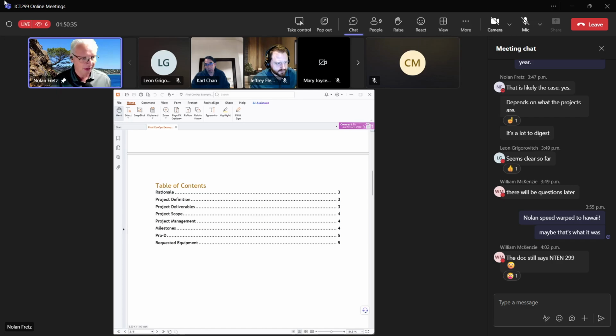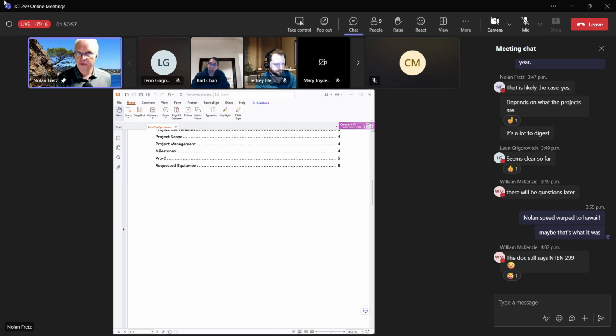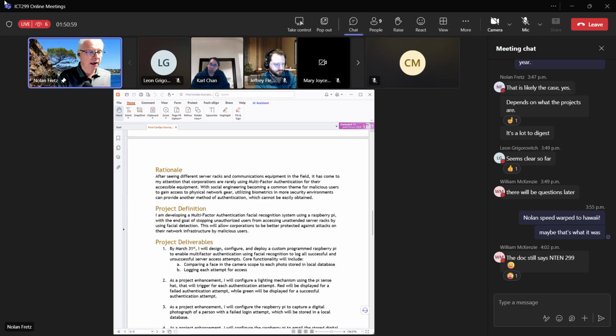So why are we doing this? Why are we bothering? A definition, a list of deliverables. So what are my products going to be? A set of scope, which is what's in, what's out of what we're trying to do here. Comment on project management and the specific milestones. The Pro-D statement, and then some ideas around, I'm going to need some gear for this. He's got a section for requested equipment at the end. So it looks nice. Professional level document.